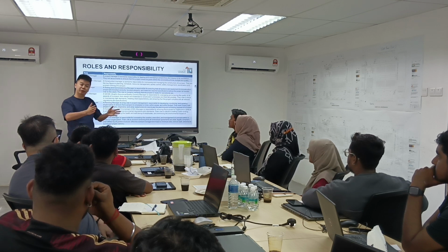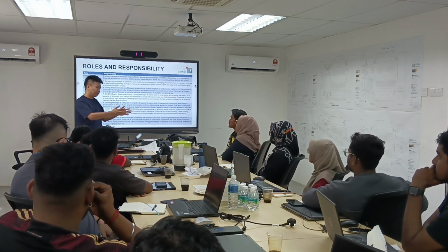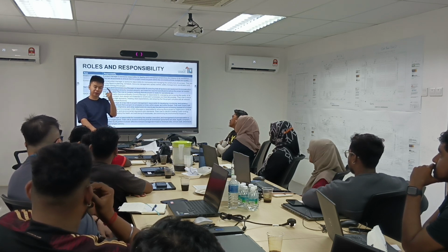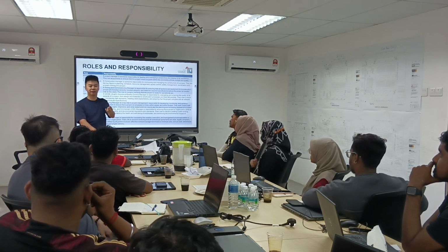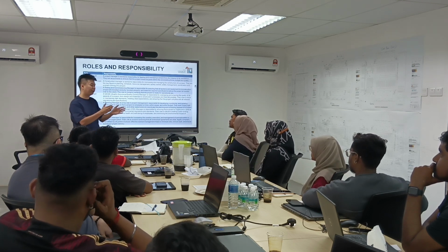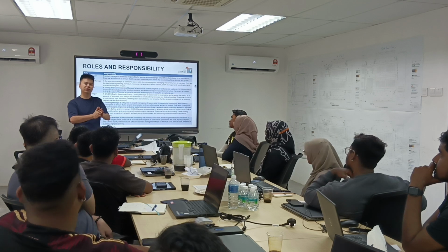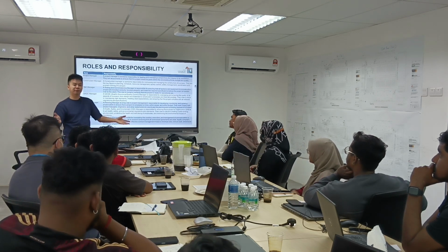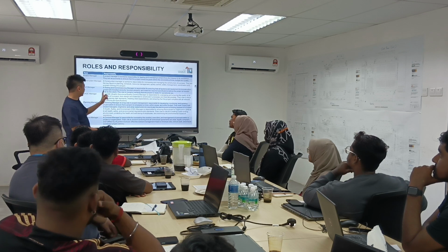After he relates this, like I said just now, moving a TV from outside to here, you can have two guys finish in 1 hour or one guy finish in 2 hours. So the planning manager should think about all these things and then come out and tell you, in order for us to finish this building in 1 year, we might need 500 staff, something like that. So this is the planning manager's role.